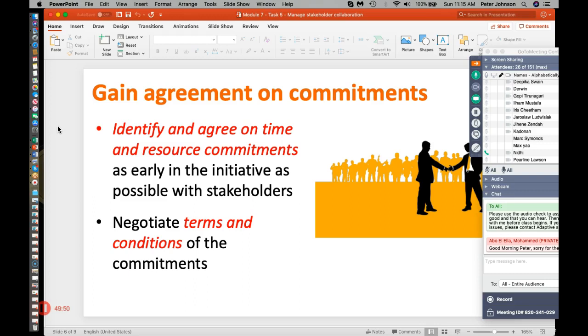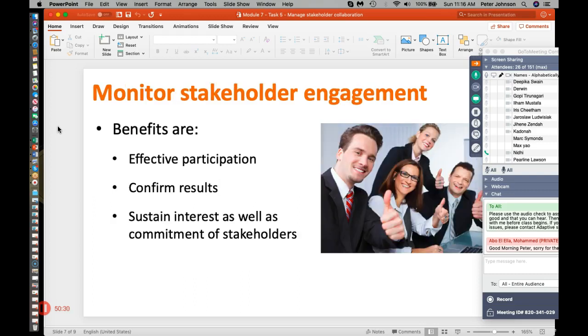If we're having a hard time agreeing on, say, estimated resources or who's involved doing what or whether requirements are in or out or prioritization, then sometimes just going back and doing a little bit of negotiation, using a technique like MoSCoW, must, should, could, and won't, will help us get over that, help us come to a better conclusion. Sometimes there's trade-offs involved. Sometimes there's delayed review or subsequent follow-up review, which helps put somebody at ease. So anyway, all those things allow us to accept a path forward and continue, as opposed to not agreeing with a path forward and having some cause for dissension.